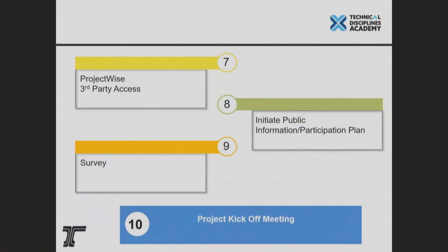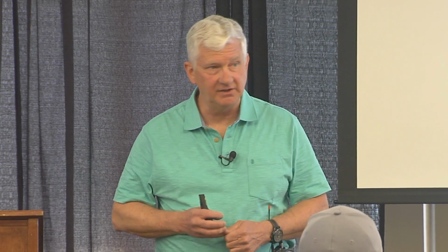And then the project kickoff meeting is kind of the summary. It's kind of what I call all hands on deck. We get everyone together in one room. The consultant is going to be there, all the staff, all the necessary people that might have a piece in this, including public outreach, just all the different people who may want to get involved in the project or should get involved in the project, put them together in one room, kick the project off. And again, that's the responsibility of the project leader to organize that, run that, and you'll be a part of that.